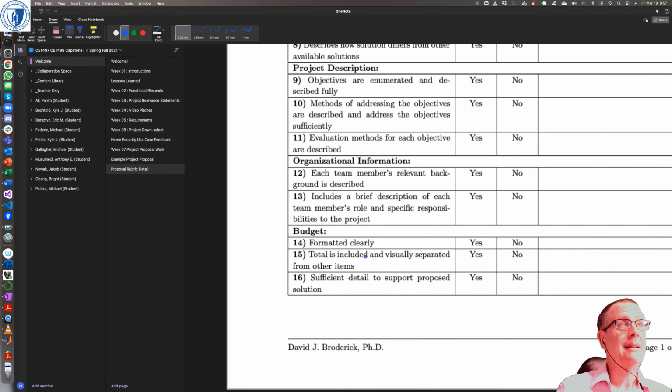Don't forget tax, shipping, and delivery time. When I was a newly minted engineer, that was one thing that always caught me out. The suppliers would say, yes, we have it for that price. Well, actually, they'd say, yes, that's the price. But they wouldn't tell me that, well, actually, we can't deliver it until 6 weeks after you order it. Right? So you've got to ask for price and delivery, or price and availability.